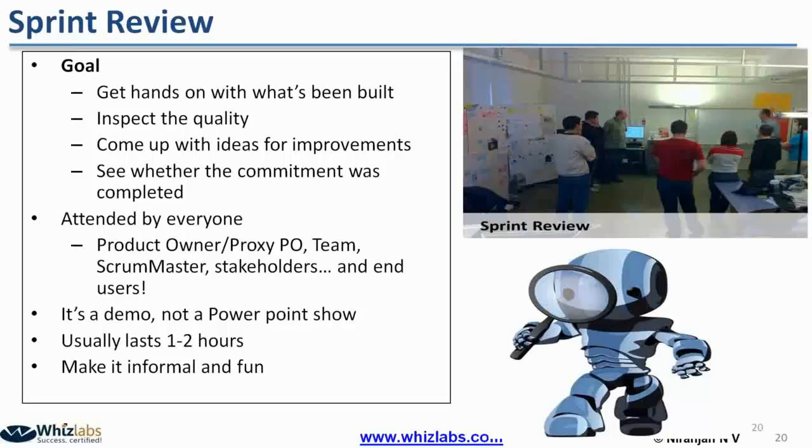Second item is that every piece of code going for sprint review has to be unit tested. Without unit testing done, such code will not be given for sprint review. These are some important things. Otherwise, if you don't do the unit testing and just check in the code, you may land up with a lot of quality issues which will impact the customer, and the team may lose its reputation.